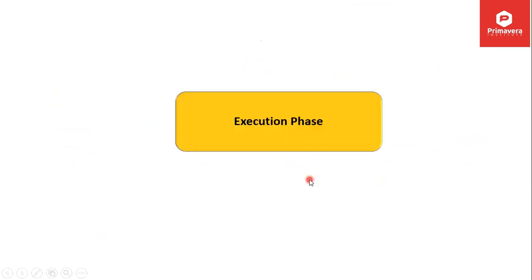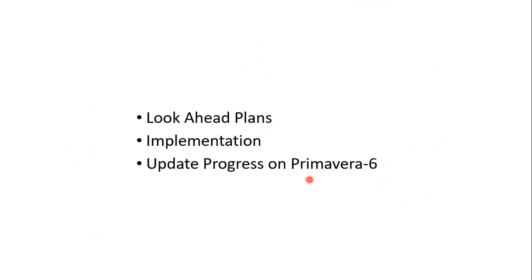In the execution phase, you prepare look-ahead plans. Once you have your project schedule, S-curves, histograms, and tracking method, you are in the implementation phase. On a weekly or daily basis, you prepare Primavera 6-based look-ahead plans, hand them over to the implementation team, and get back the data. Site engineers, shutdown engineers, and supervisors update Primavera 6 with work done. You update your Primavera 6 reporting based on site work.